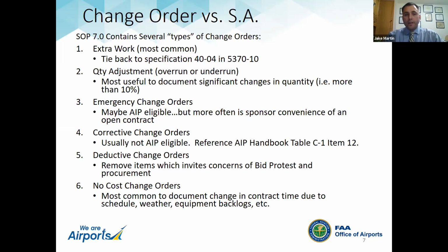The other issue is if it is ineligible, proceeding with ineligible change orders is generally okay. You'd want to run that by your program manager because there are some specific concerns about additional costs to the government under grant programs when involving non-eligible work. So if it's a small issue, it's probably not a big deal, but of course, the larger the dollar size, the larger the amount of scope you're asking for an emergency change order just enters additional conversations and questions.